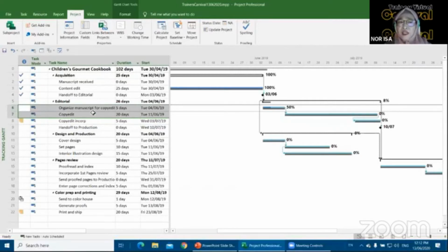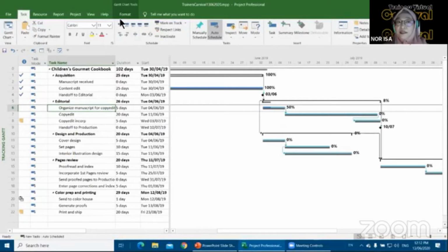Okay, so the resource came back to me. We're not going to be able to do this in 5 days. We have gone through 2.5. That's another 3 days that we need. I'm going to switch over to the task tab and I need to update this. I'm using the ribbon task in the schedule, mark on task, and the button that I want is update task.